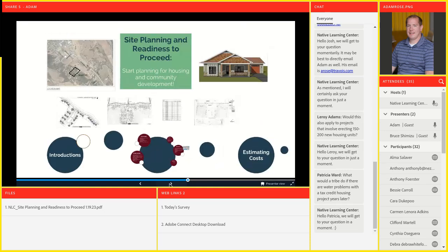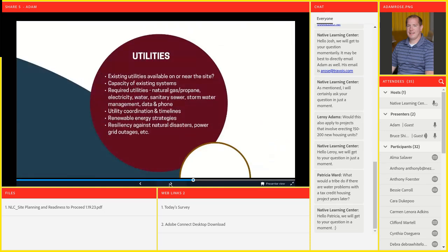Yeah, once you get any kind of approval from a local jurisdiction, you get really excited. You go, okay, nothing can stop us now. And then you submit your plans to be reviewed, and they come back with comments that you respond to, and then you resubmit your drawings, and then there's a whole new set of comments. You say, well, why didn't you pick this up last time? Oh, well, we can't pick everything up. So you make the changes and resubmit, and then you pull your building permits, you're on site doing work, and then the building inspector comes out and says, oh, by the way, you need to do this.